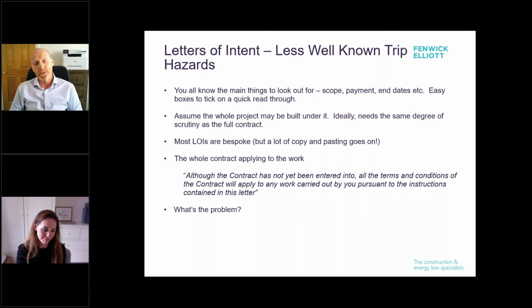But again, you should always really assume that the whole job is built on the back of a letter of intent. Now, what that means, of course, is that they really should have the same level of scrutiny as a full contract. You may only have 4 or 5 pages, but should you look at that just as carefully as looking at 120 pages? I would say yes, if you want that certainty.